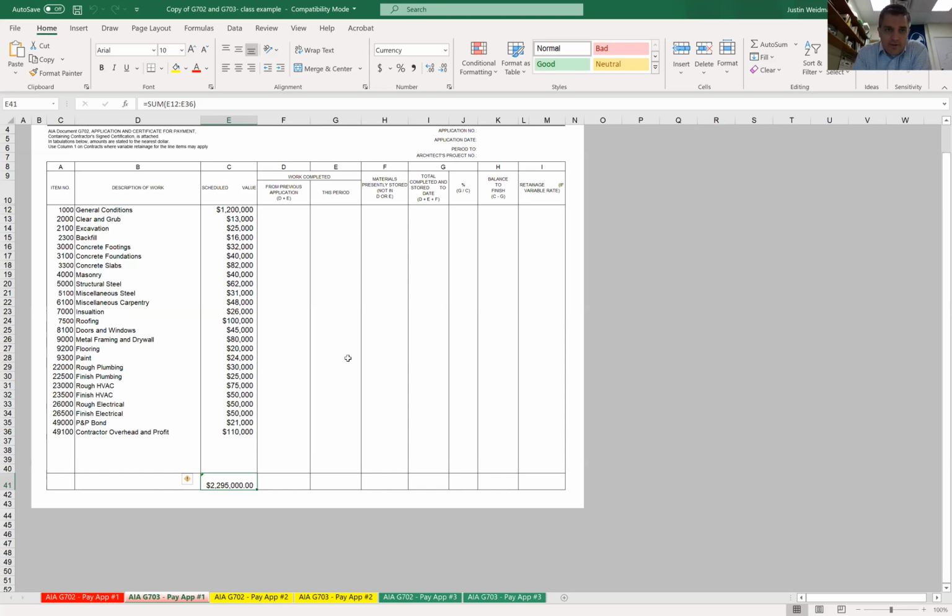But you don't want to become dishonest and say, well, I've done 80% and you've only done 20%. That loses trust of the architect and the owner. But if you can bill for 11% instead of 10%, sometimes that's to your benefit, because then you are trying to work off of a positive cash flow as opposed to you financing the project.